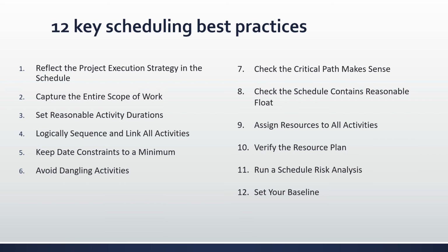During project execution, measure progress against the baseline to determine if you're behind or ahead of schedule and whether any schedule variance that crops up affects downstream work. During this analysis, take extra care in examining any out-of-sequence updates.